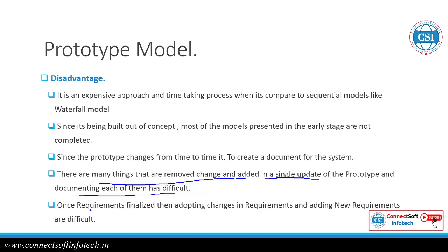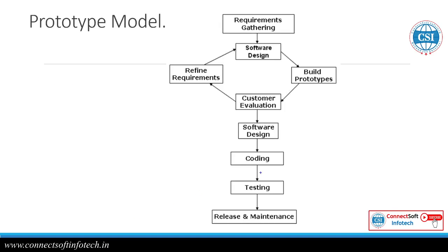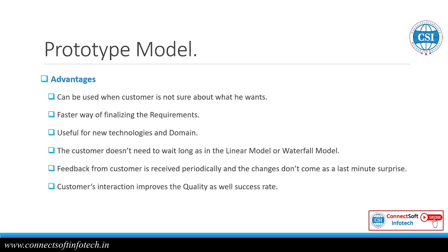Once the requirements are finalized, adapting the changes and adding new requirements is difficult. If you freeze the requirements, it is very difficult to add a new requirement. Once the requirements are frozen, we can go for the actual development process. If you are in the actual development process and new requirements come in, it's very difficult to work on that. So this is the disadvantage of the prototype model.